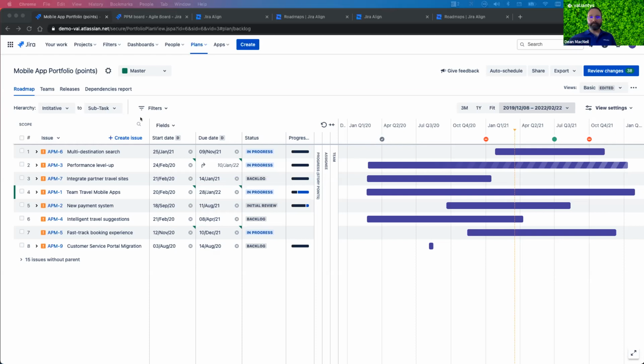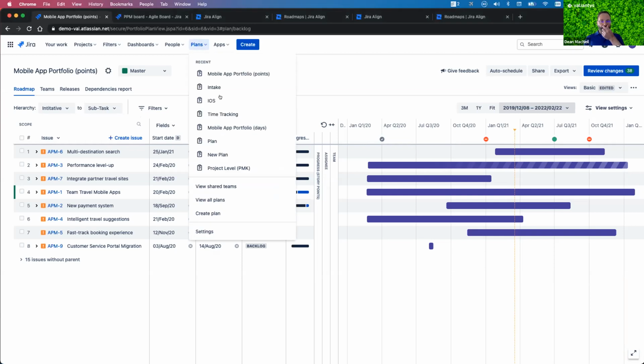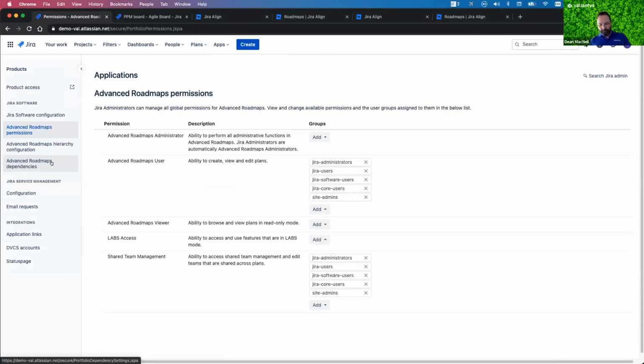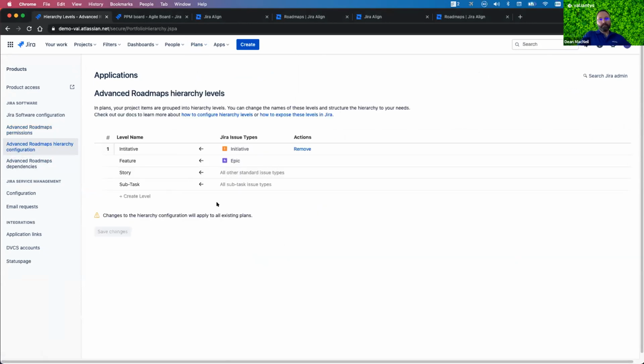And Advanced Roadmap really lives in Jira, right? It's just another view of your Jira data. What it will do and what is very helpful is it actually is the only way, if you're familiar with Jira, to actually build a hierarchy over the epic, right? And this is one of the key features that will help support this portfolio level, this ability to create parent link relationships between new issue types that you're going to be able to create, like initiatives, and you can even go higher than that if you want to, above the traditional epic, story, bug, and task, as well as subtask layout that you usually get with Jira that is fairly fixed and difficult to change, right?